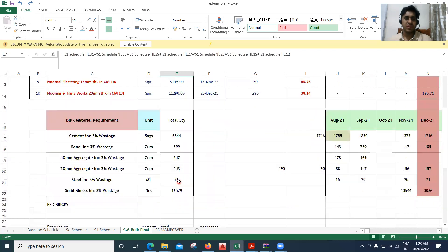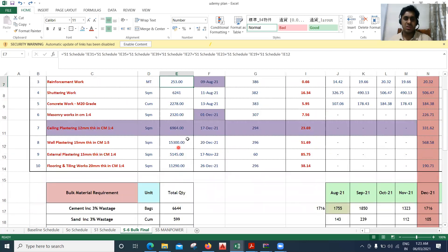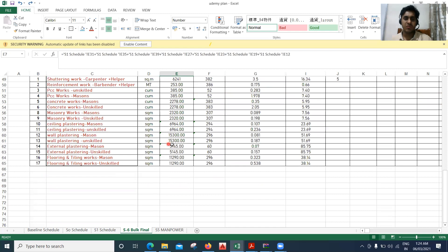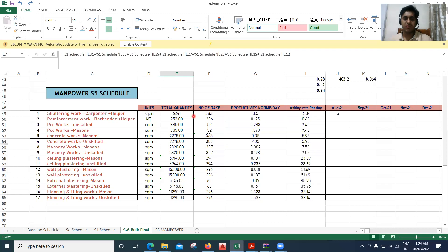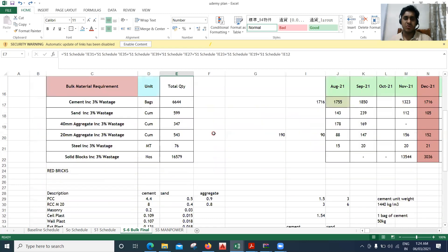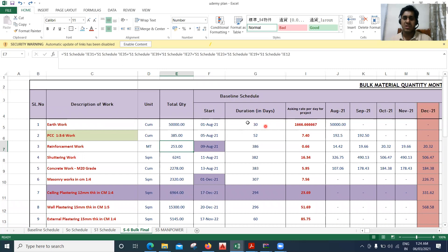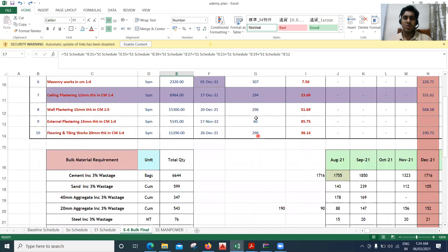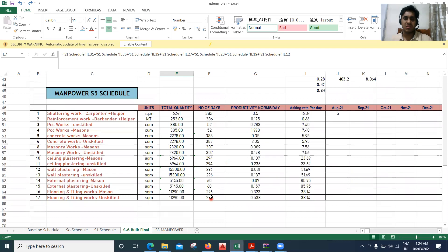For wall plastering, you can see it is 15,300 square meters. So here I've written 15,300 twice — once for masons and once for unskilled people. After that, the number of days — the durations are taken from the schedule: 30, 52, 386, 382, 307, 294, 296, 60, 296 — whatever values you have there, the same thing is written here.